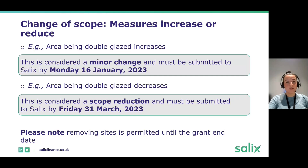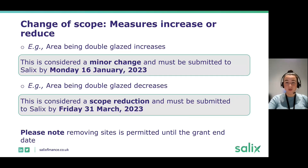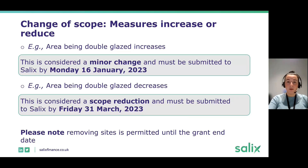If you decide to reduce the scope of a measure — for example, reducing the glazing measure — that's a scope reduction. The deadline for that is the grant end date of the 31st of March 2023. It follows the completions process in that you'll just need to provide an updated application form so we're aware of what measures went ahead. We won't need to authorise this change request; it's something you'd share with us upon completion.